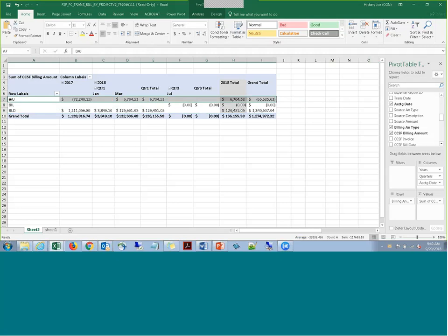And then very few folks are using prepaid functionality, but when you're running prepaid grants, it'll show up in this query as UTL, as utilized, which would be the same thing as a BLD, right? But instead of creating a new bill for a receivable, it actually just utilized that deferred or liability account amount. And then there is UAJ, which is a utilization adjustment, which is kind of like a billing adjustment. Again, I don't anticipate most of you will see that one until you're really using the functionality. So really, you can focus on BIL, BLD, which are the main ones: to be billed and has already been billed.